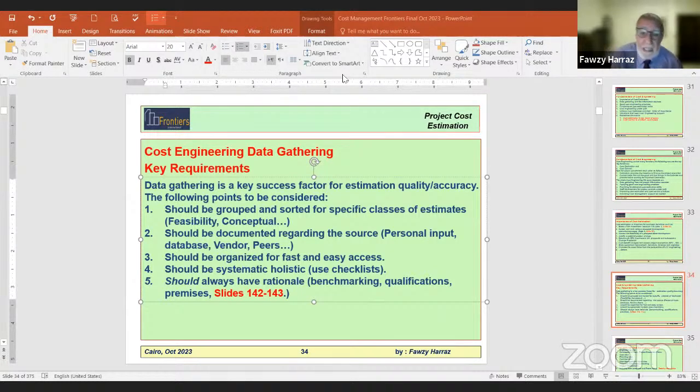But in the invitation to bid, there are instructions that the owner is free to cancel the bid without any justification. The safest way in this case is rebidding, to escape from this lowest bid. Lowest bid, highest bid, either, as you said, ignorance, lack of knowledge, lack of study, or intentional, just to take the bid to hide financial problems inside this contract. So this is how to handle it with government: cancel the bid and rebid.